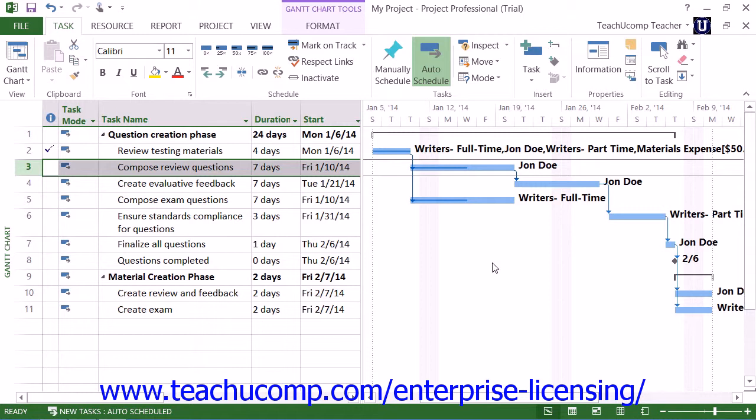One reason that you can do this is that some tasks can be front-loaded or back-loaded, meaning that the majority of the work is incurred at either the beginning or ending of the task's marked period of duration. In these cases, too, you may need to update the actual work progress made on the tasks, which may not correspond directly to the task's duration or percentage complete.